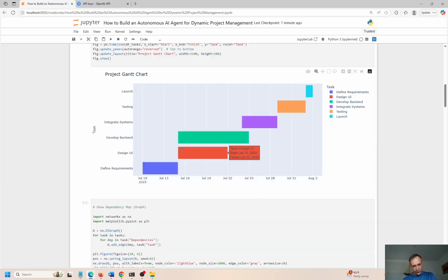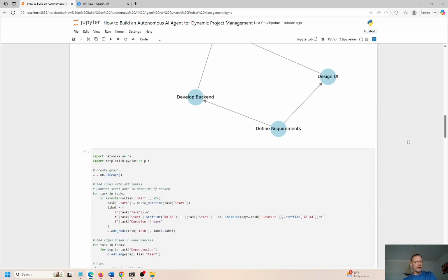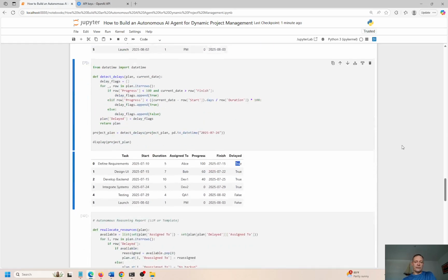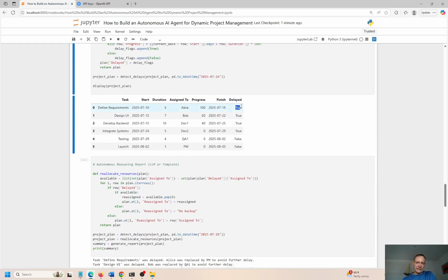So red and green can't start until blue finishes off. Purple can start a little bit overlapped with green. Red is presumably done at this point. Orange can't start until purple's done, and blue can't start until orange is done, right? So we do have some pretty tight deadlines. There's quite a few dependencies, and any kind of delay is really going to cause an issue, right?